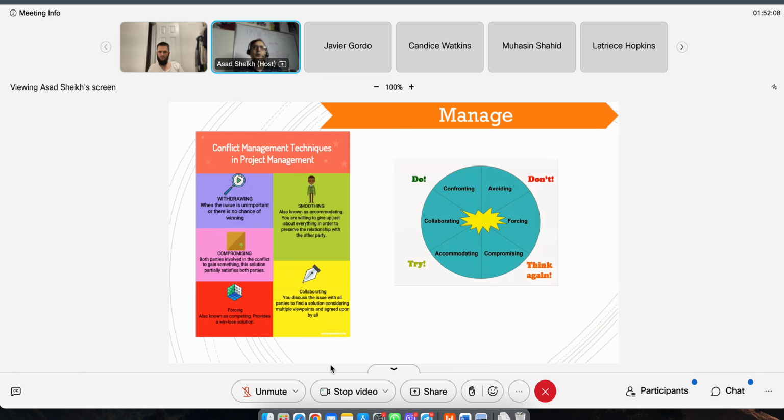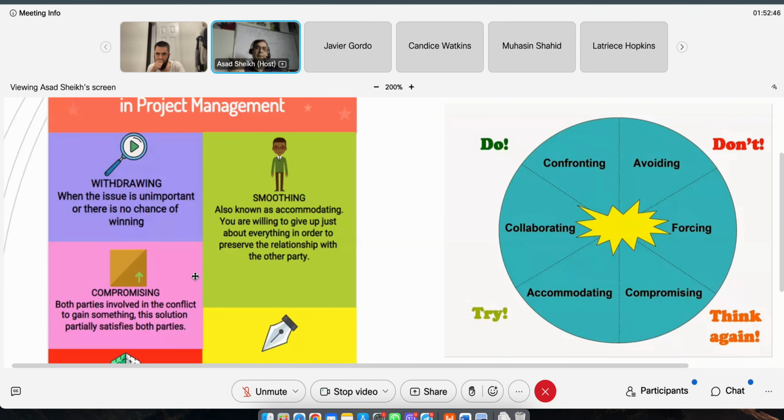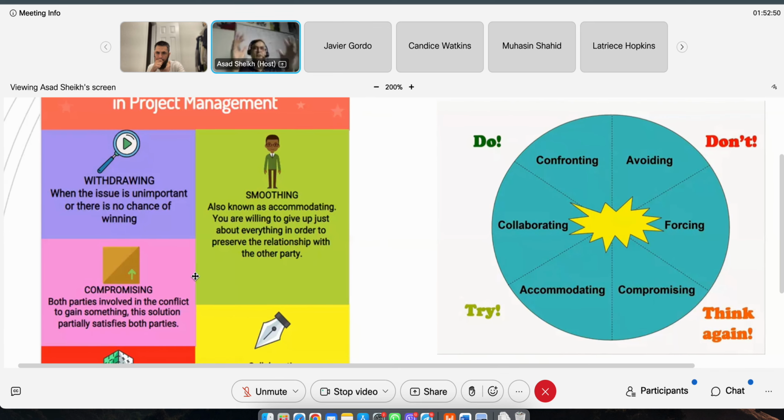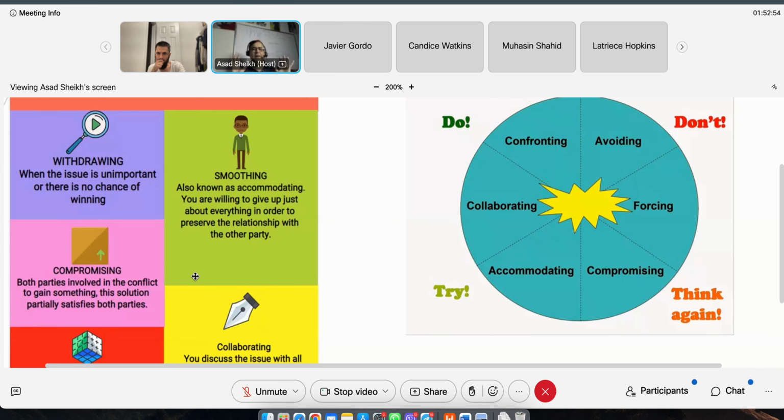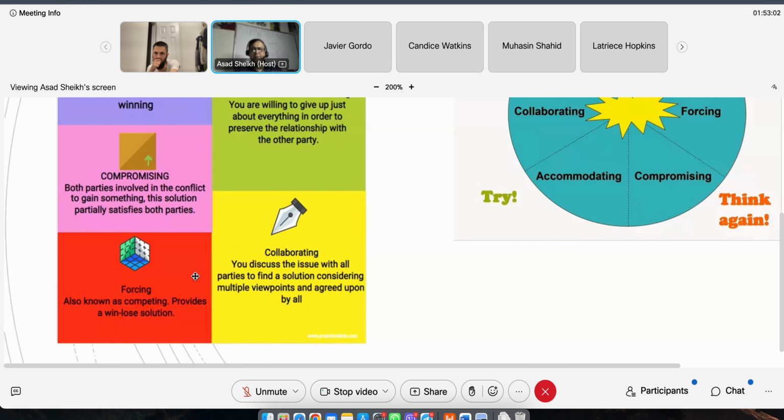When the project is following the agile methodology, then the role the PM takes on is that of a servant leader, which means that they are very supportive of the effort. They're hands off because the subject matter experts or the team members are very experienced in what they do, and they know what they're supposed to do. So they really don't need to be told what to do. Once you give them a task, give them a user story from the backlog, where they pull out those 5 things from the backlog and they start to work on those 5 things in that 2 to 4 week sprint. The PM really becomes hands off and just, or the Scrum Master, same thing, Scrum Master or Project Manager, hands off and just tries to support them. So that's what's going on there.